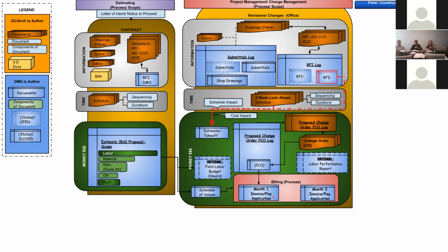And when we submit this billing, there's a whole payment process. So once we've done the billing, doesn't mean that they sign a check that day. It means that they've approved it, and it may take them 30 to 60 days before a check actually comes in.